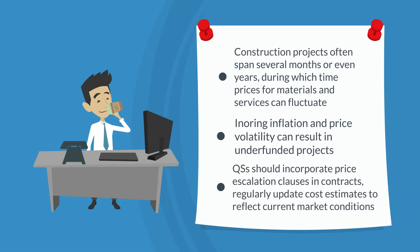QSs should incorporate price escalation clauses in contracts, regularly update cost estimates to reflect current market conditions and consider purchasing materials in advance or locking prices by agreement with suppliers.